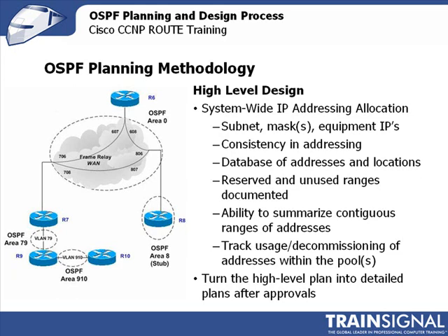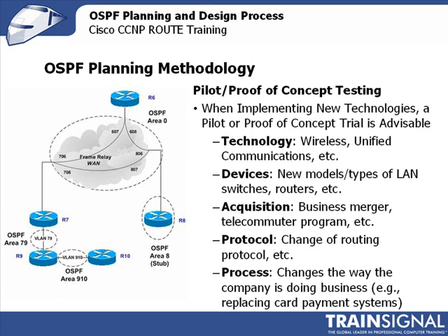and then track usage and decommissioning of addresses, and turn this high-level plan into a more detailed plan after approvals. If you're putting in a new technology, you may want to do a pilot or proof of concept. This is true whether you're doing a new technology, whether you're trying new devices you haven't used before, whether there's an acquisition that's coming, if you're changing a particular protocol or set of programs you may be using, or processes. But a proof of concept can help you actually make the mistakes in a controlled environment and avoid making the